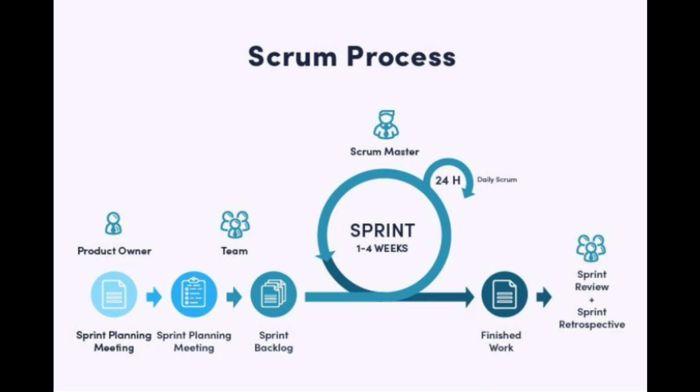What if something is not going to work with respect to bandwidth, blockers, or any issues? Then we move those user stories to the next sprint, or we move them to the sprint backlog, and from there we move those blocked user stories to an active sprint or upcoming sprint, which comes under the product owner's ownership. The product owner has to agree to that before deferring any user story or task to the next sprint. So this process which we need to follow comes under project management.